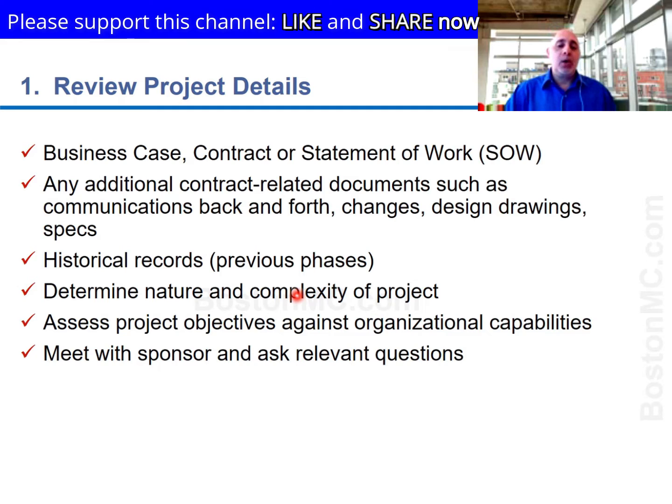Whereas if you want to do something only in one unit or one department and it's a very specific request, it's usually not that complex. So the more the hands, the more the people, the more the ranks of the people who are observing, the more the complexity. The more the requirements, the more the complexity. The more the challenges and uncertainties, the more the complexity. And the more the complexity, the more thorough you need to be with how you manage that one project.